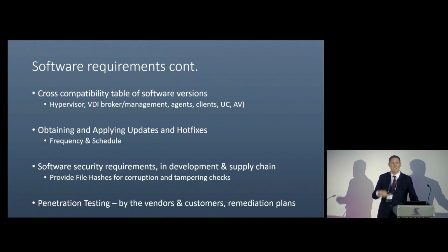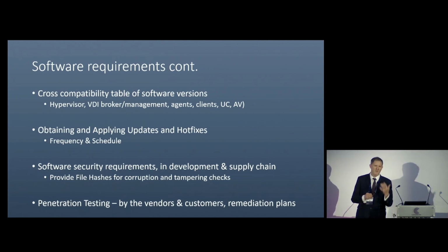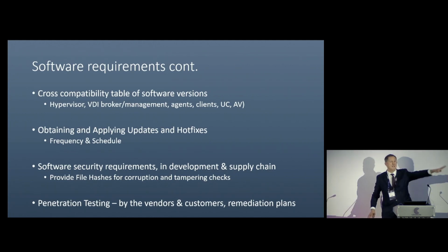So when you're deploying it, again, like the hardware, I sometimes have to provide file hashes and signatures so the customer takes our software in and checks it against tampering and corruption before they deploy it. So I have to send those separately. There's the source files, customer. These are the checks and balances, customer.